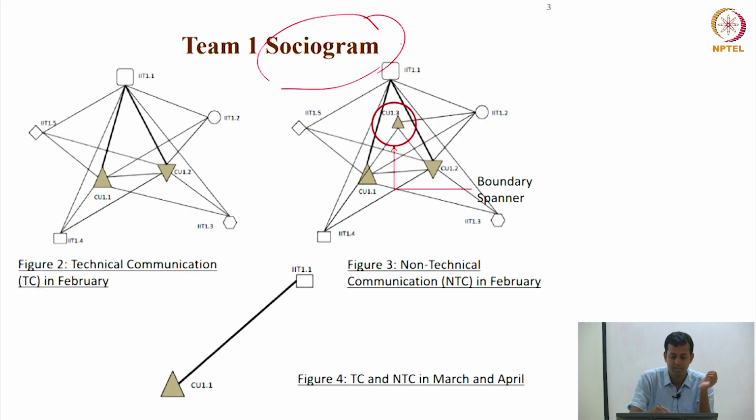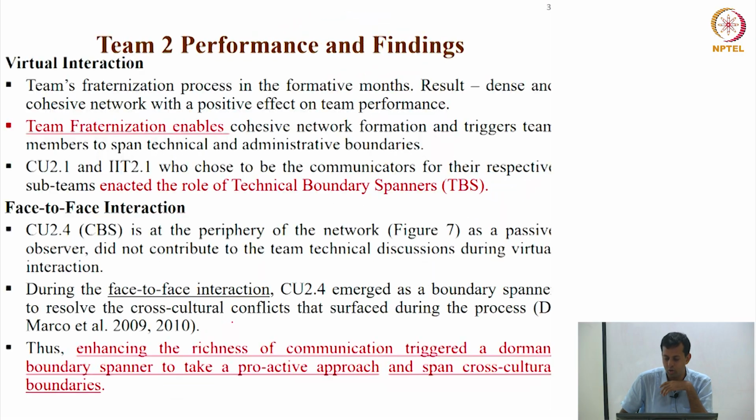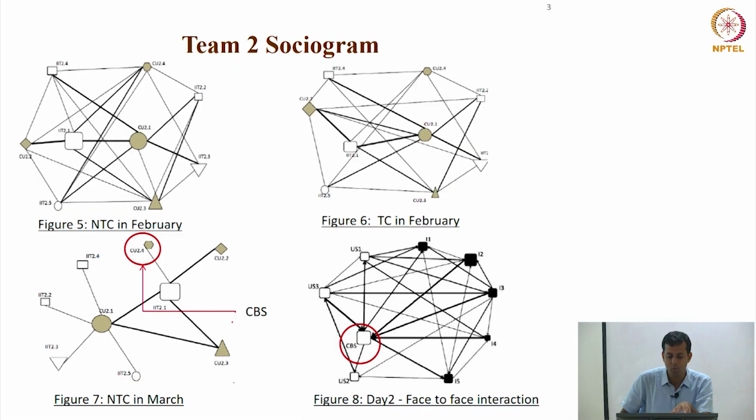So you can see there's a network here, it becomes far more dense over a period of time, and then becomes far less dense, right, where both teams had one representative and they exchanged information, right? You can look at these kinds of networks, what happens with these teams, and then try to see if these networks can actually predict project performance, right, and it turns out they can. Sometimes very dense networks tend to do better than other networks, and so seeing how a network forms and performs and changes over time is often a very important and useful tool to see how projects might actually take place.